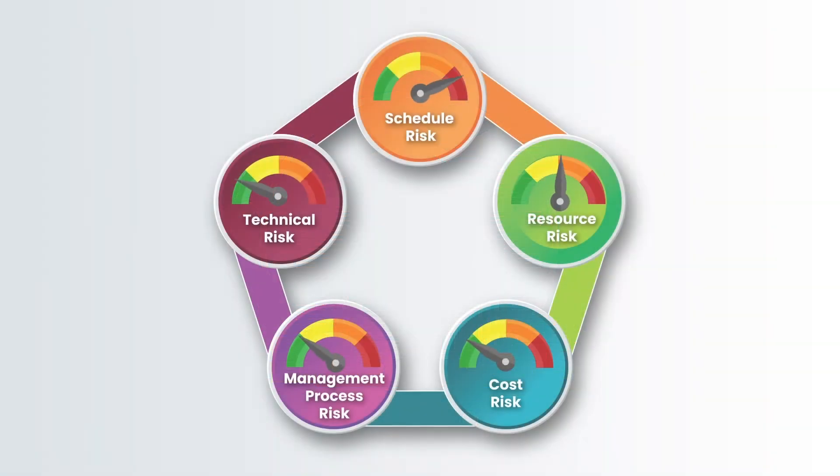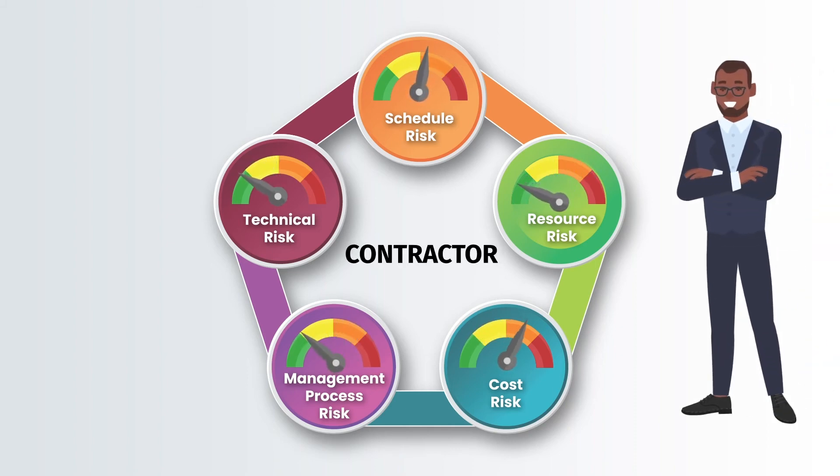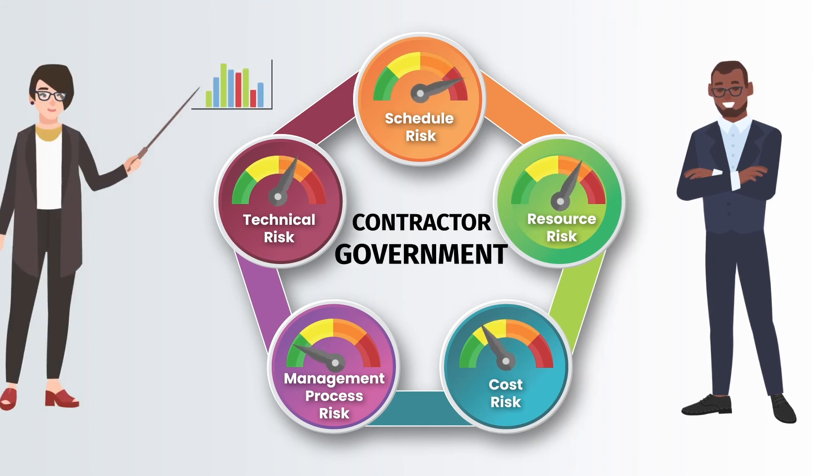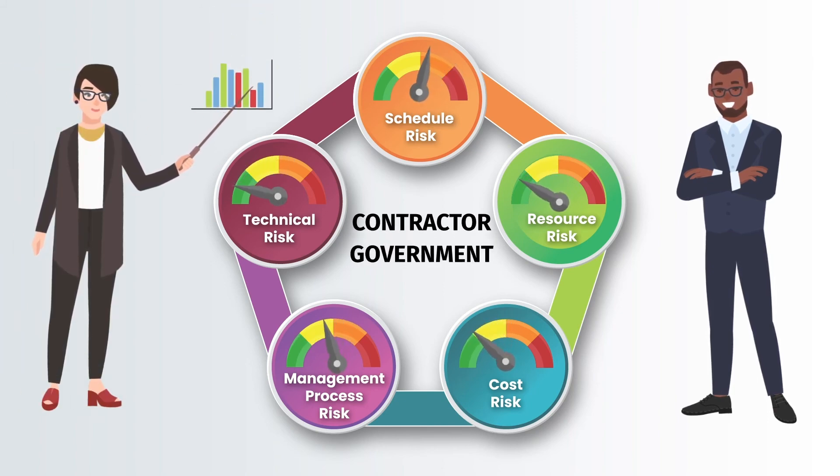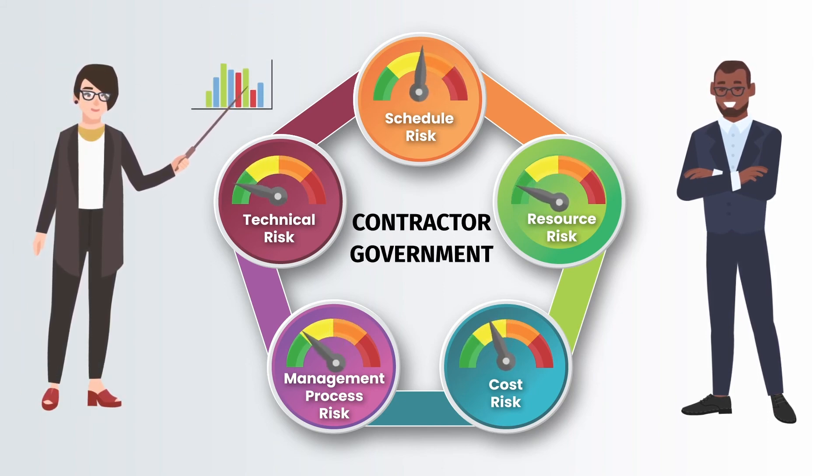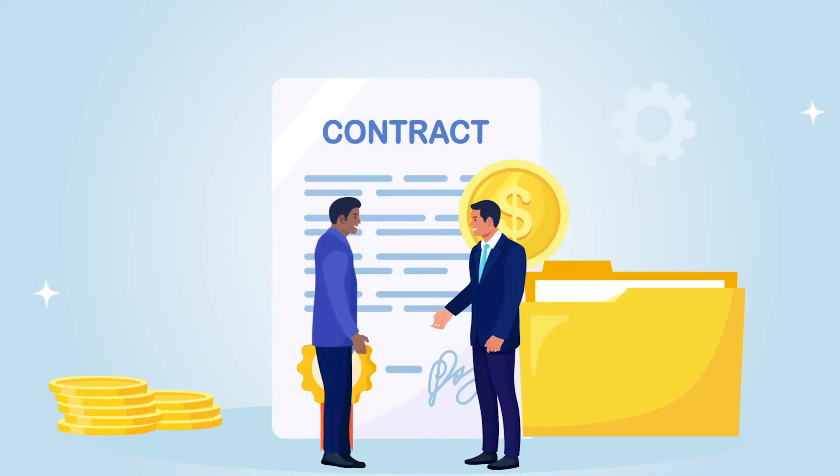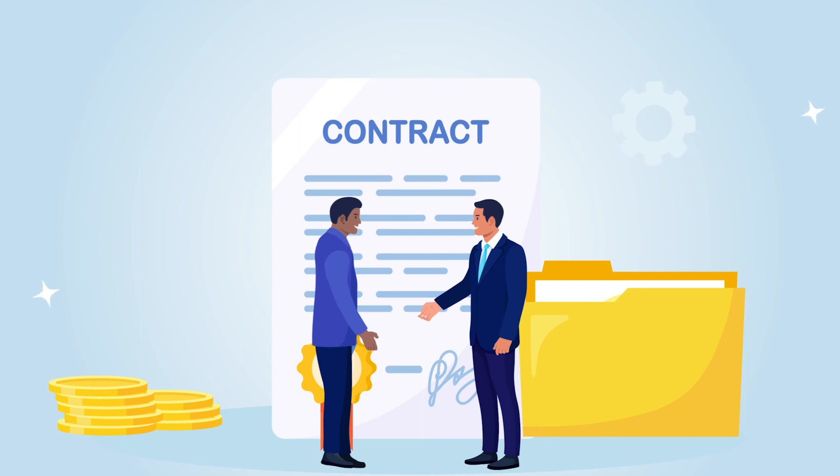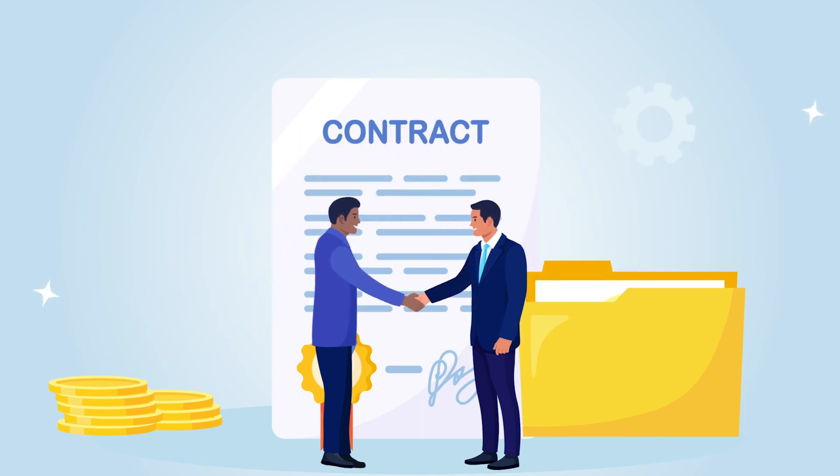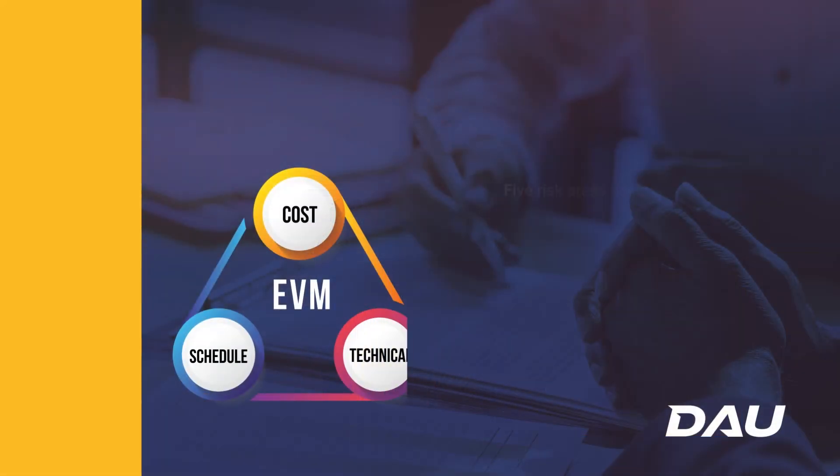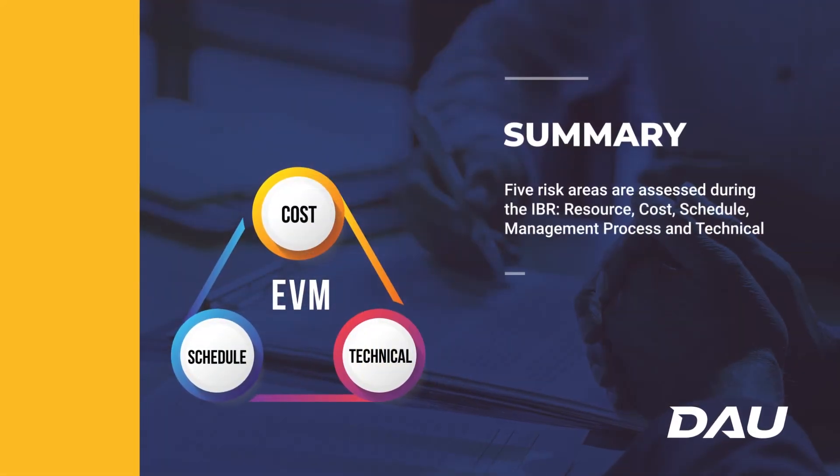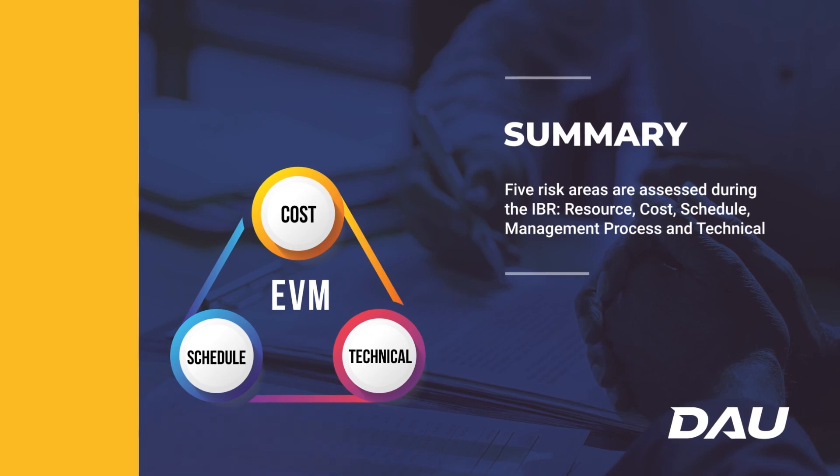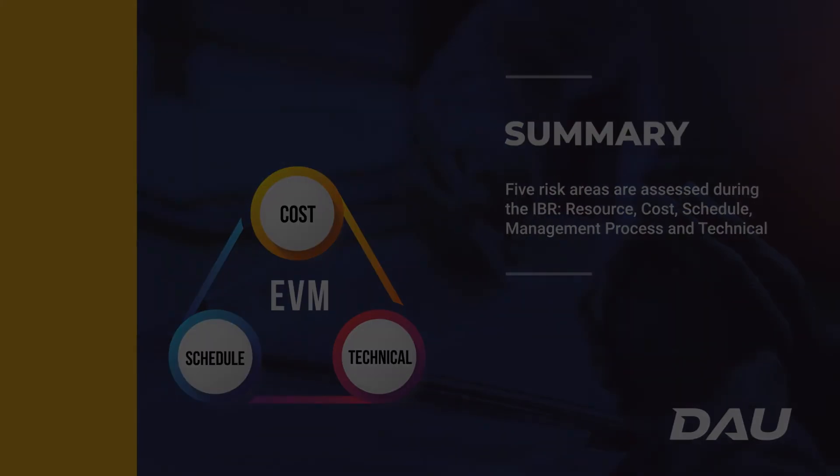During the IBR, each of the five risk areas are assigned a risk rating. Both the contractor perspective and the government's perspective should be considered when finalizing the risk ratings. The ultimate goal of the IBR is for the government team and the contractor team to come away with a mutual understanding of the risks involved with the baseline plan.